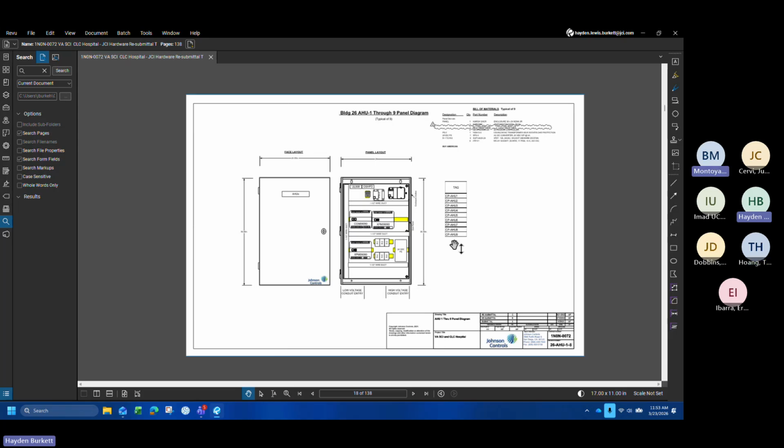No, I can answer that. We're planning the full key turnover at substantial completion, which hopefully is in the April timeframe. If anything like that comes up, we'll need to identify it as a team, as something that we need to work with our M&O or locksmith or whoever we need to make that happen. But good catch.